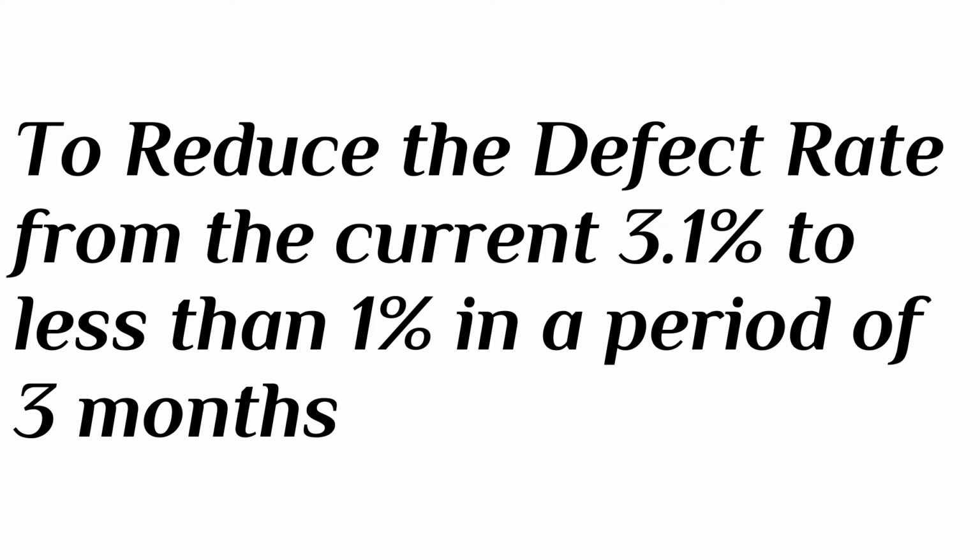Let's have a look at the goal statement example. To reduce the defect rate from the current 3.1% to less than 1% in a period of 3 months.